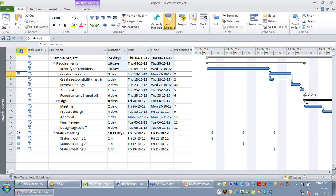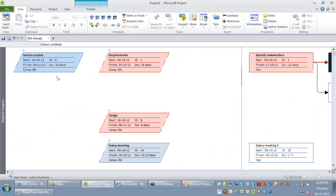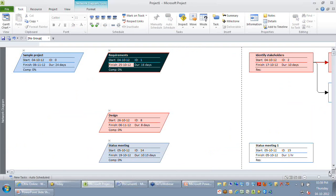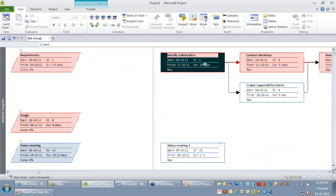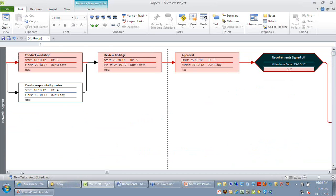On my network diagram, you can see my activities are represented by different shapes. The parallelograms represent the summary activities and you can see the rectangles represent my normal activities and my milestones are represented by polygons.